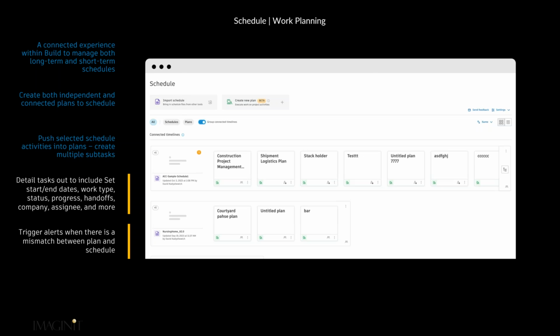Well, now we have this work plan that has been introduced to the schedule environment. So work plan will allow us to connect specific tasks, maybe detailed tasks, or assign them to specific people within a schedule line. So you are able to connect these to the schedule, or you can create completely separate work plans that are unrelated to the schedule for tracking things like milestones, progress, and tasks that are associated to users within the project.